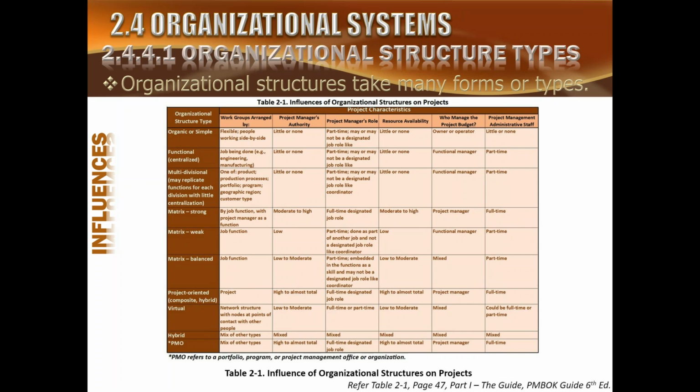So here what we are doing is we are trying to put the same worker under more than one boss. In this specific sense, in a functional organization where a person is answerable to the functional manager, we have also made this person answerable to a project manager, right? For project purposes. So unity of command is there. For project purposes, the project manager is giving him orders, and for functional purposes, the functional manager is giving him orders. So this is efficient, that we can get the job done by the same person. We do not hire another person, but the same person is allocated to more than one boss.